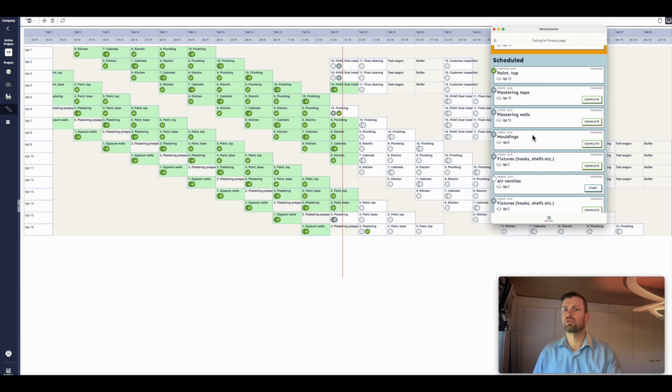So this is the core thing that the work groups have to do. They need to follow their tasks, and this is used also in the morning huddles, so that before they come to the morning huddles, they will update their task on what they have been doing and what has been accomplished during that task. And on the morning huddles, they can also share their views on how the schedule could be improved or how everything could be made so that they could do their work.